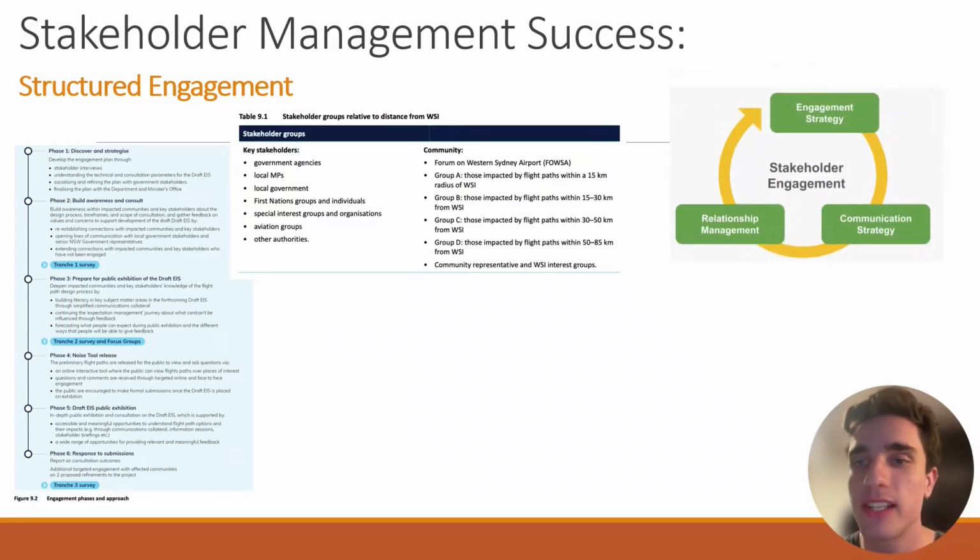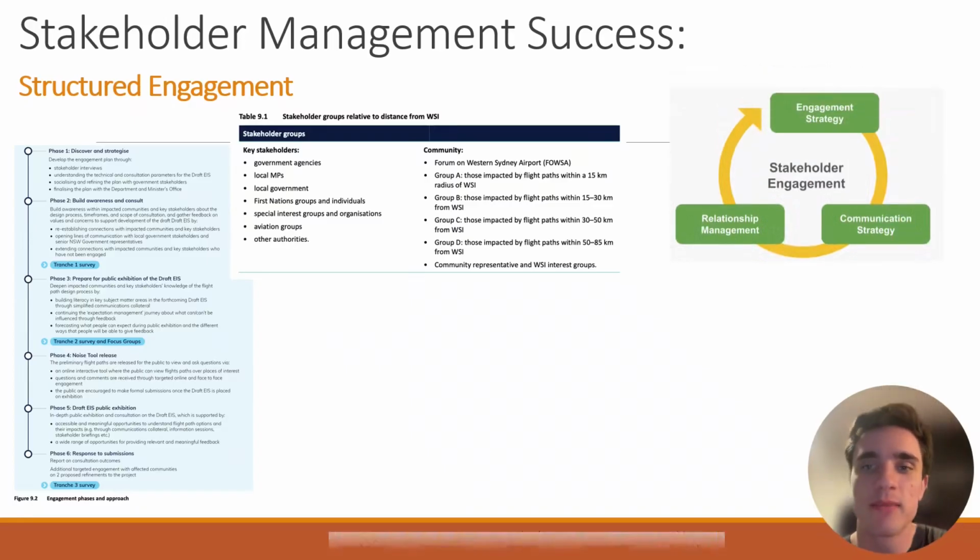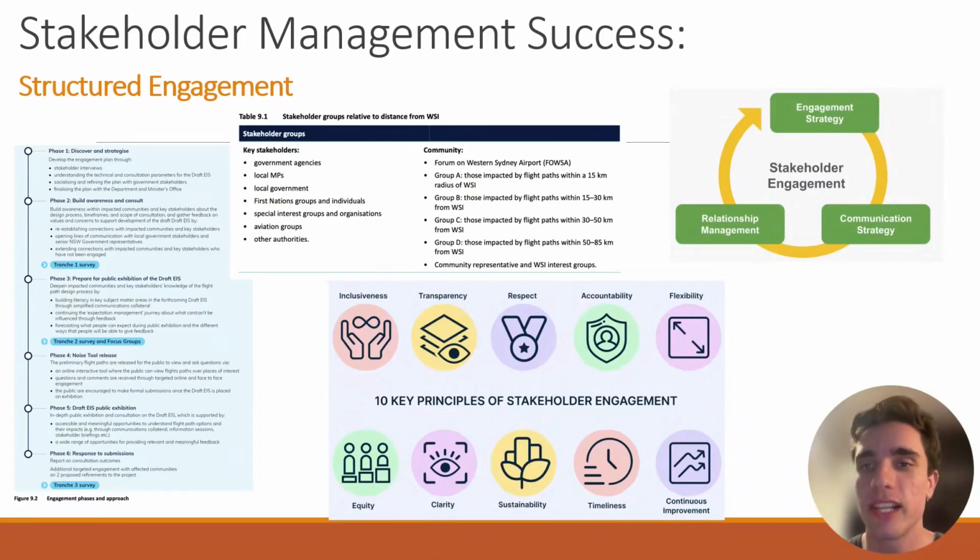This is a positive example of the PMBOK process of planning stakeholder engagement, because different stakeholder groups were not all treated in the same way. The project recognised that a general community forum was useful for broad project issues, while First Nations cultural heritage required a separate and more focused engagement pathway.